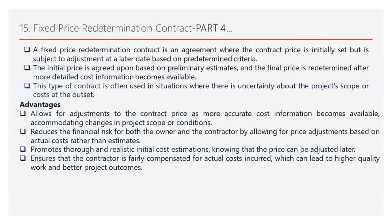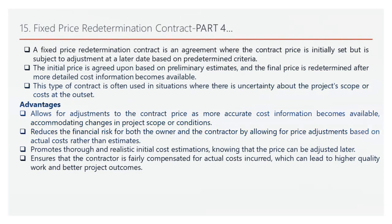Let's begin by understanding the fixed price redetermination contract, a type of agreement designed to provide flexibility in uncertain situations. The initial price is set based on preliminary estimates but is subject to adjustment at a later date based on predetermined criteria. The final price is redetermined after more detailed cost information becomes available. This contract type is often used where there's uncertainty about the project's scope or costs at the outset, allowing both parties to start without waiting for exact cost details.